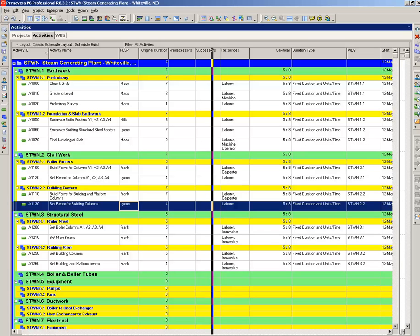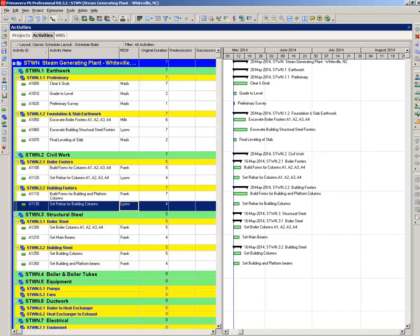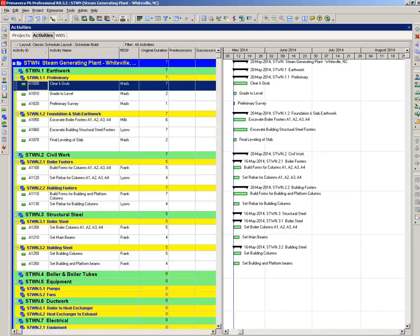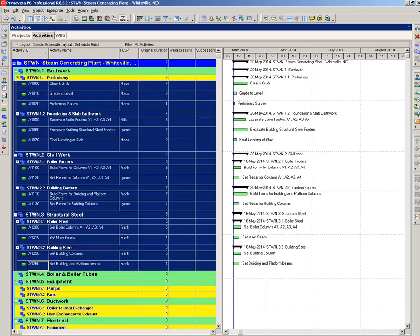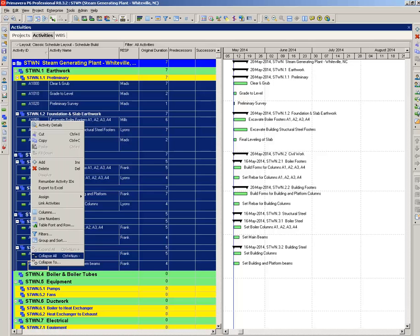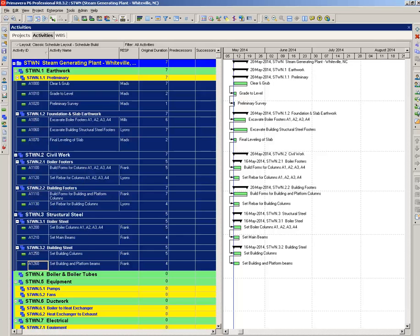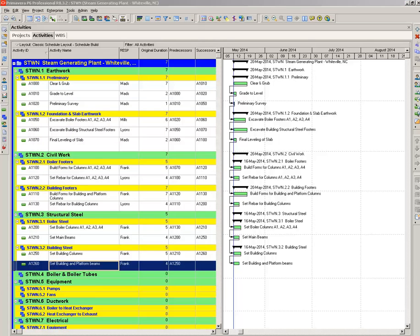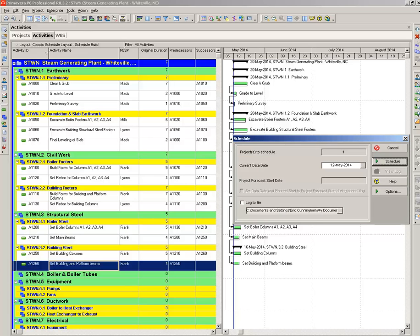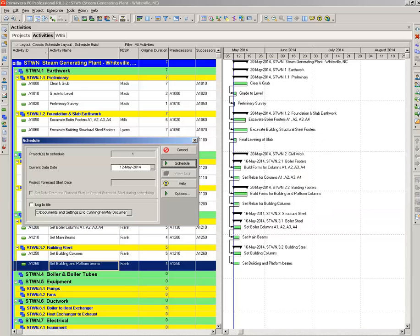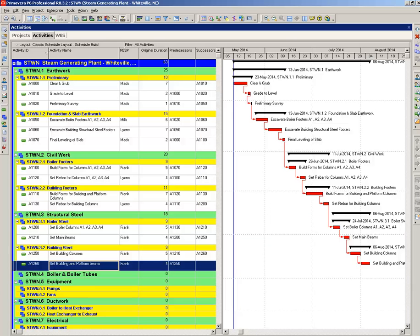Now we still have all these activities sitting on the data date. Not a problem. Very quick. We select this one, and with the shift key left click, we select all the activities. Right click, we are looking for link activities. There we go. And notice finish to start activities on the Gantt chart for every activity that was selected. So we just select one here. Schedule. I'll bring that over some more, bring it over here. Schedule. Boom.